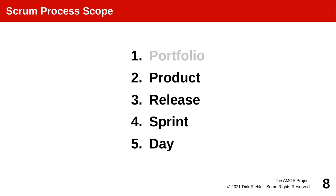When we talk about software development, we need to look at scope and complexity. At the largest level, a company has business units with product portfolios; within those portfolios are individual products. Products evolve over releases, releases are built from sprints, and sprints are based on daily work. Scrum tells us how to handle everything from day-to-day activities up to single products, but nothing beyond one product or project.